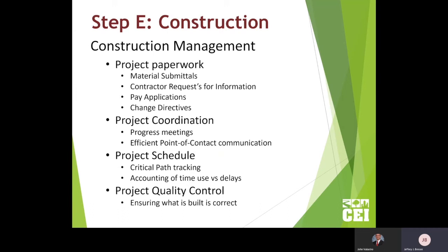Engineers processing pay applications is the process of really making sure it's fair, but in protecting the owner, we have to make double sure that the money going out the door doesn't get ahead of the work that's actually being done, putting the school in a situation where if, for whatever reason, one contractor can't finish and another has to finish, we don't want to be in a situation where there's not enough money to pay the second contractor. These jobs are all bonded, and you can always go against the bond to get any difference.